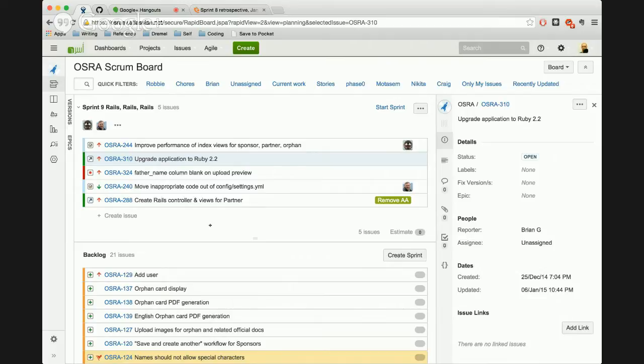Yeah. I think you might have had discussion about it, but I only found out about it today, that the chore that was given to, what was his name, Matt, I think, about adding foreign keys. Yeah, it cannot be done until we upgrade to Rails 4.2, but we cannot upgrade because ActiveAdmin is locked to below 4.2. I guess the idea was that it's unnecessary because soon we will upgrade to 4.2 and it allows the foreign keys. I guess that was the idea.